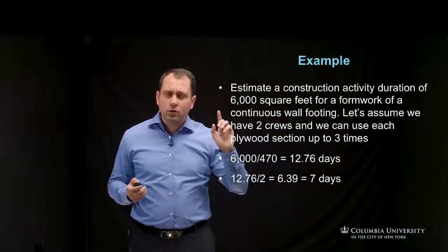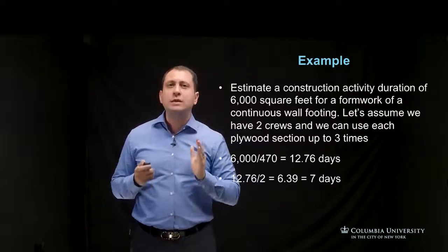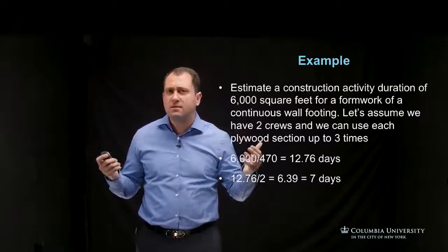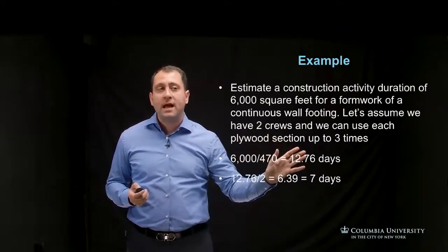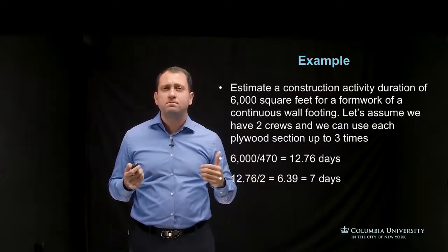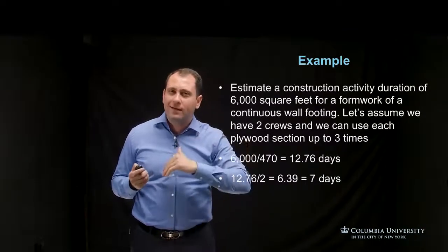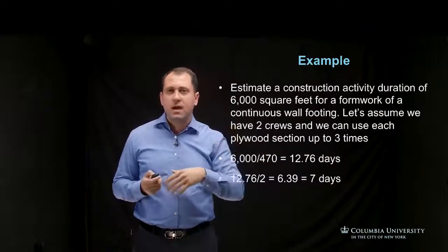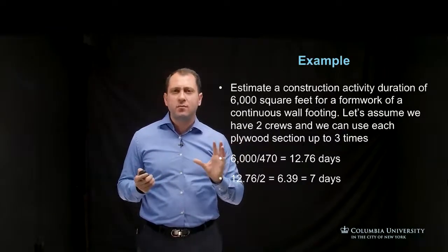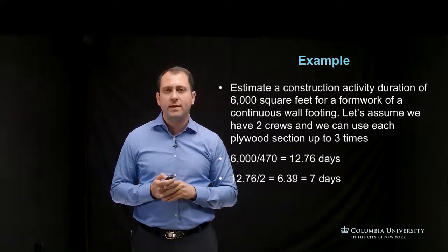In practice, you should check your estimates with a superintendent or experienced estimator working with the planning team, rather than relying solely on mathematical analysis. Also worth noting: working days differ from calendar days. Five working days equal one week — Monday to Friday, or Sunday to Thursday in some countries. These are the judgment and common-sense factors to consider when estimating duration for any construction task or activity. Thank you.